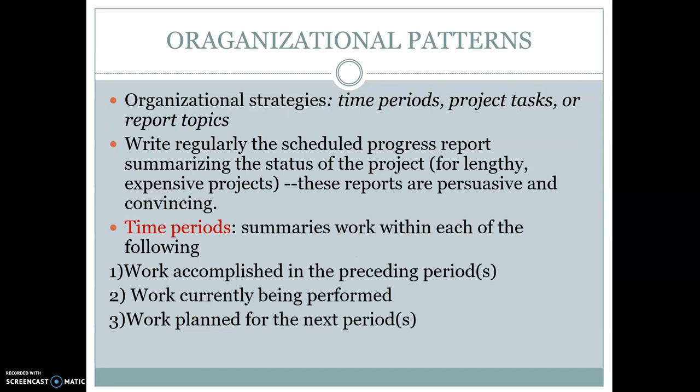Now we'll look into the organizational patterns for progress reports. The recipient of a progress report wants to see what you have accomplished on the project, what you are working on now, what you plan to work on next, and how the project is going in general.